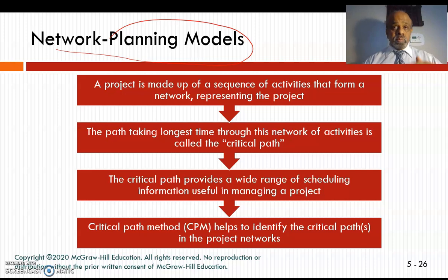After that, you're going to put the ceiling. After that, you're going to put the doors and windows. And after that, you're going to put the flooring. So this is a series of activities. And then you're going to put in the electricity and so on and so forth. So this is a sequence of activities that you're going to be performing when you're putting up a small room.